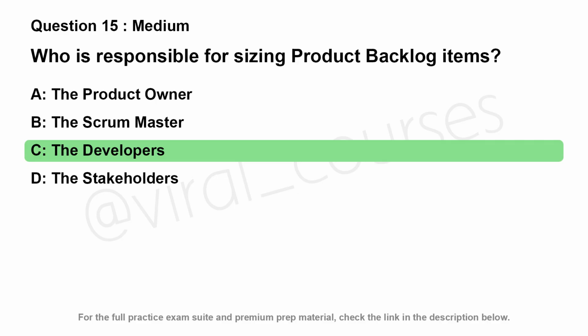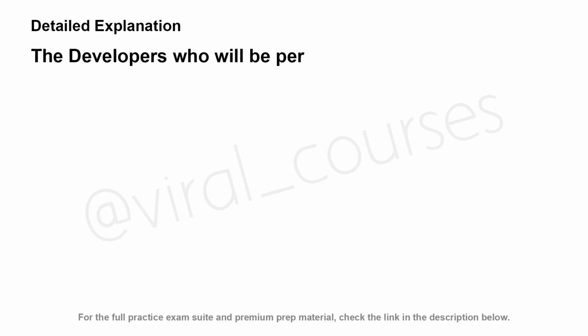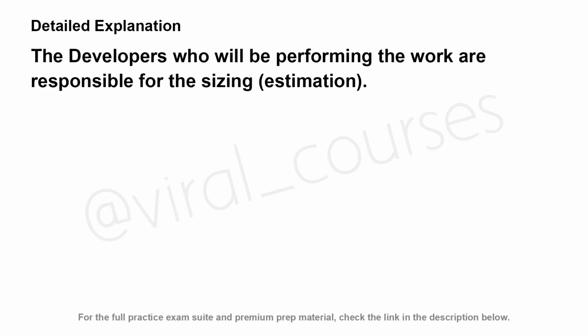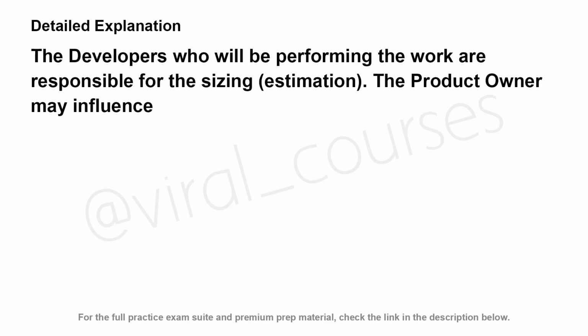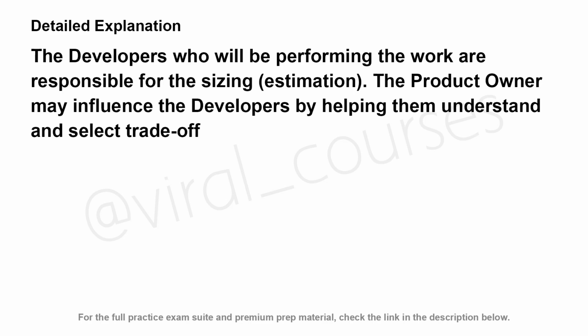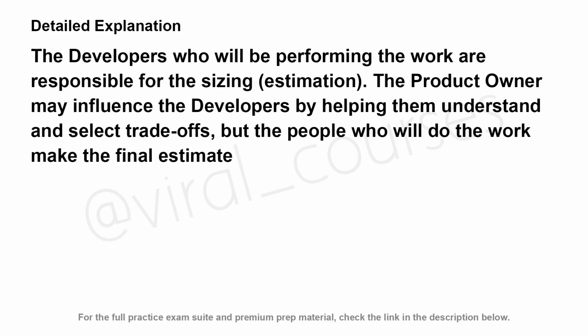The correct answer is C. The developers who will be performing the work are responsible for the sizing estimation. The product owner may influence the developers by helping them understand and select trade-offs, but the people who will do the work make the final estimate.